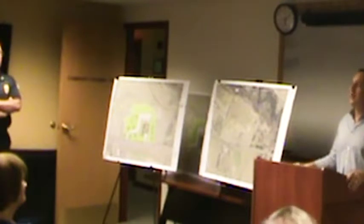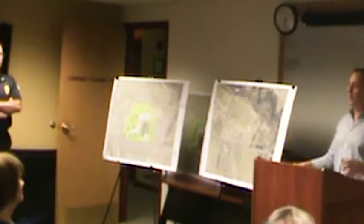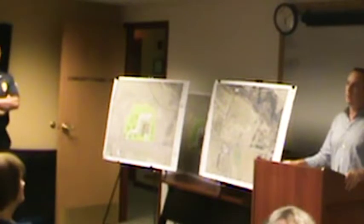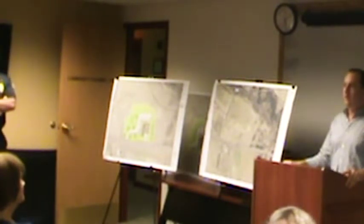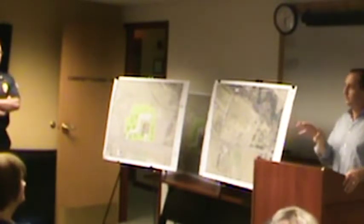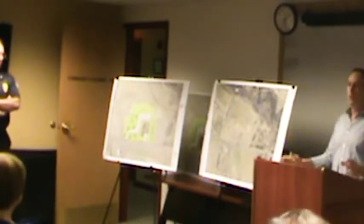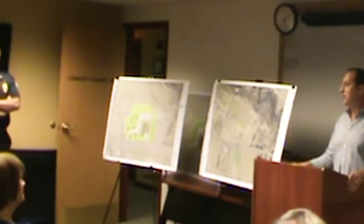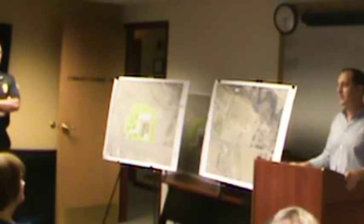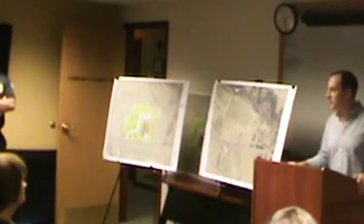Luckily, while the project was on hold, the town found another lot in town, on the west side of River Drive, at the intersection of River Drive and Stockbridge Road. The town purchased that in December of last year, and technically it's lot 19 River Drive. That's where the project is, and there are no concerning soil issues on it. The property is a little over 9 acres in size. If there aren't any questions, I'll hand it over to John and Carlos, and they can get into building and site design.